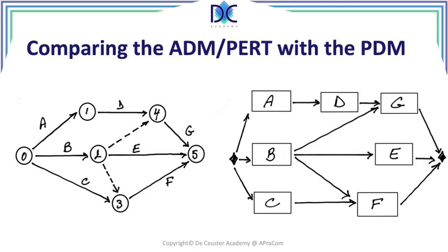This is how we completed the network diagram, and you see that there are some differences. When we have the dummy activities in the arrow diagramming method, we don't have those in the precedence diagramming method. Now both results or both networks are equivalent, and we can use any of those. Most of the time in the PMI you will find the right hand diagram, the precedence diagram. It's still possible that you will find the arrow diagram, but it's less used today.